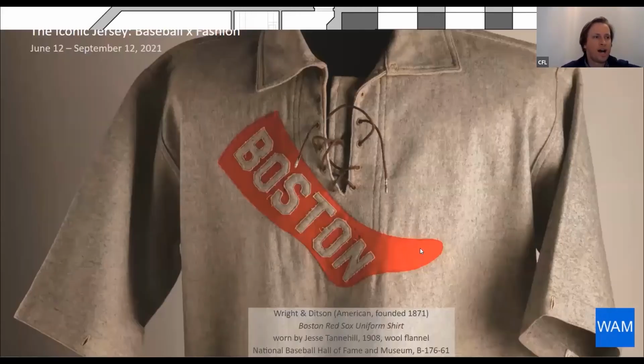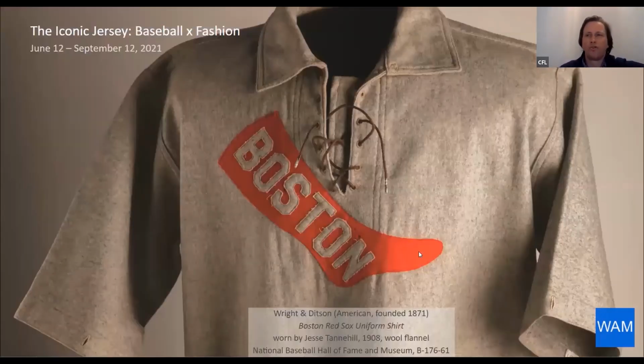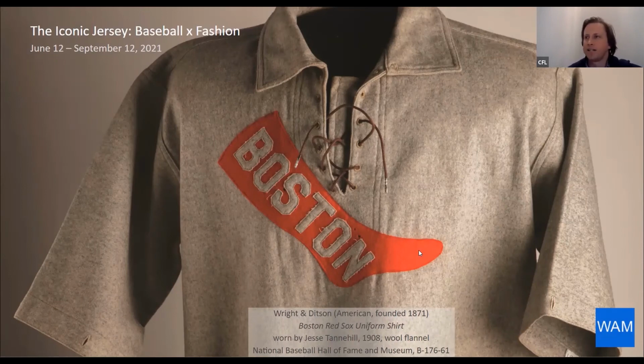So with that, the goal for the Lancaster Plaza project is to complete that project in time for the baseball exhibition. We get weekly updates from the contractor, and we're slated for substantial completion on the 28th of May. So what you may see if you come visit for the baseball exhibition is what the industry refers to as punch list items. But the goal is really to have people entering the building, using the elevator, and enjoying the Lancaster Plaza for the baseball exhibition.